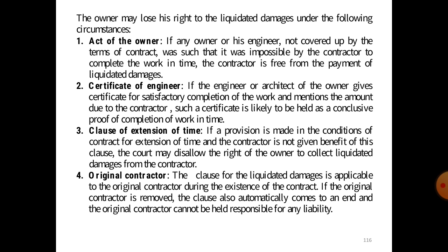The third circumstance is the clauses of extension of time. If a provision is made in the conditions of contract for extension of time and the contractor is not given the benefit of these clauses, the court may dissolve the right of the owner to collect the liquidated damages from the contractor.